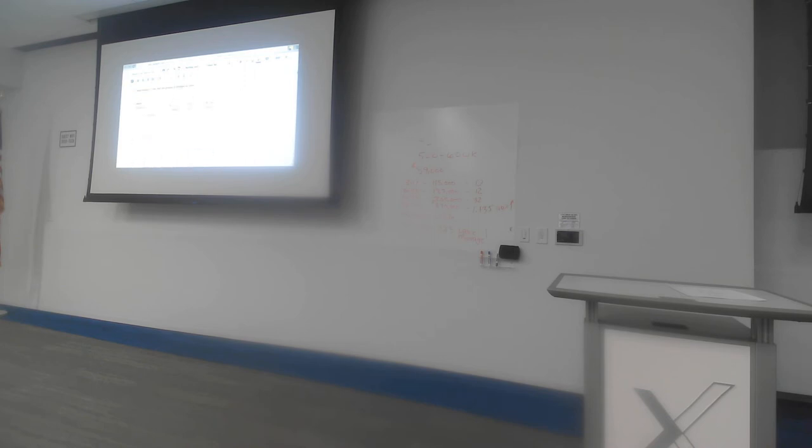I'm going to crash E by another day. So it's from 16 down to 15. Crashing E by another day, I've only got one more day to play with after this. The direct cost is another €5 for the extra day that I'm crashing. It's 130 plus 5, it's 135. The opportunity cost is another €8, so minus 40. 135 minus 40 is €95. Going in the right direction all the time. It's all looking good for me, the project manager.